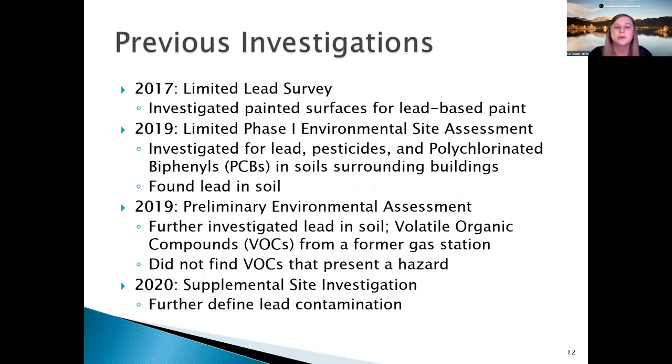And this found lead in soil. We did not find PCBs or pesticides at levels that would necessitate a cleanup. Later in 2019, the district entered into an environmental oversight agreement with the Department of Toxic Substances Control, and we conducted a preliminary environmental assessment for our oversight. This further investigated lead in soil and investigated the site for volatile organic compounds from the former gas station. We did not find VOCs at levels that would present a hazard. And then in 2020, we conducted a supplemental site investigation to further define that lead contamination.